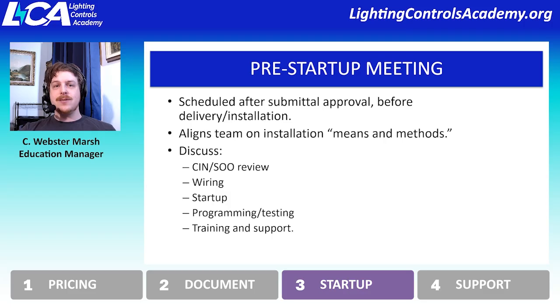Some systems don't need a technician brought in. The startup and programming can be done by the contractor. And so if the contractor didn't anticipate doing that programming, that will probably turn into another change order. But oftentimes it'll be explicit enough in the sequence of operations or in the documentation saying the contractor is going to be providing this, so please include that in your estimate.